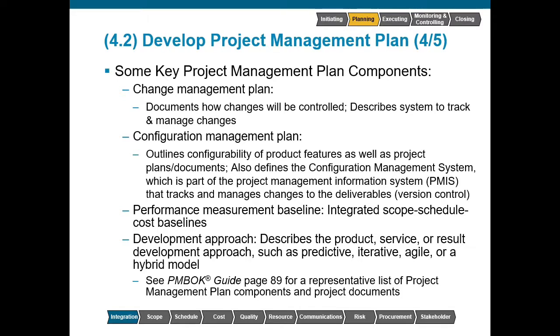The performance measurement baseline will allow us to integrate scope, schedule, and cost baselines to perform earned value analysis. The development approach describes the product, service, or result development approach, such as if we were to do a predictive lifecycle, iterative, agile, or a hybrid model.